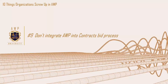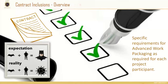Number nine: don't integrate IWP into contracts and the bid process. You might think that's a fairly obvious one, but it's a pretty regular occurring issue when we audit projects. People get into the mindset of 'the suppliers know what they need to give us, we've worked with them before.' Unfortunately, contracting requirements, templates, and expectations of your IWP guidelines are paramount. It's amazing how many contracts are devoid of IWP and work face planning requirements.